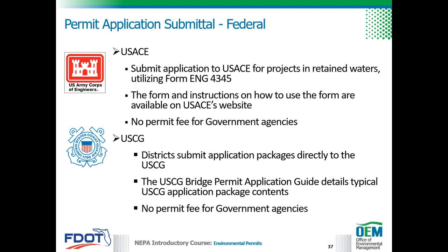The CORE permit applications for projects in retained waters should be submitted utilizing Form ENG 4345. The form and instructions are available on the CORE website. There is no permit fee for government agencies.